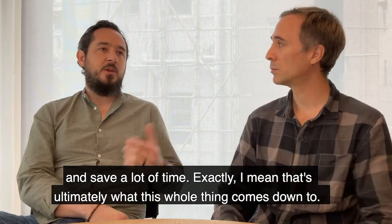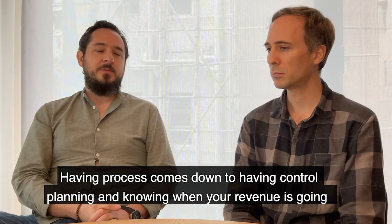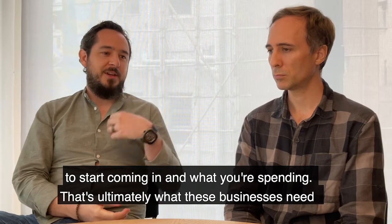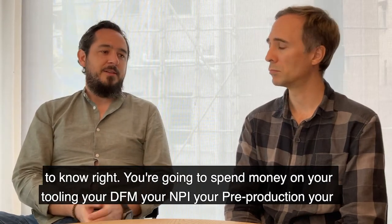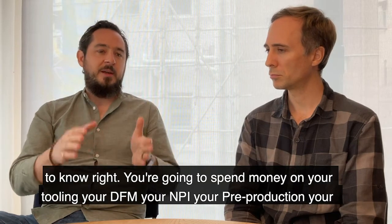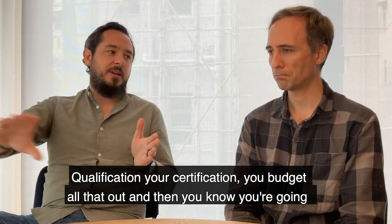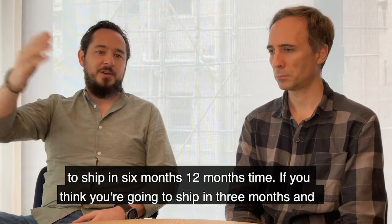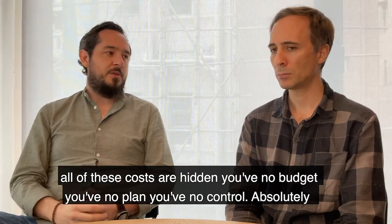Exactly. I mean, and that's ultimately what this whole thing comes down to. Having process comes down to having control, planning, and knowing when your revenue is going to start coming in and what you're spending. Like, that's ultimately what these businesses need to know, right? You're going to spend money on your tooling, your DFM, your NPI, your pre-production, your qualification, your certification. You budget all that out, and then you know you're going to ship in 6 months, 12 months time. If you think you're going to ship in 3 months and all of these costs are hidden, you've no budget, you've no plan, you've no control.